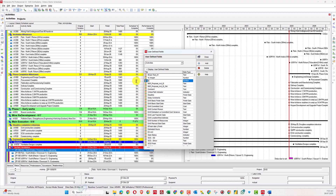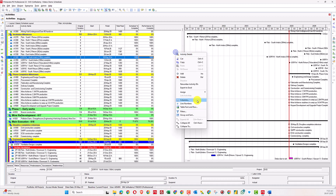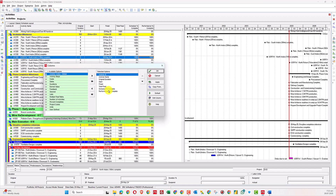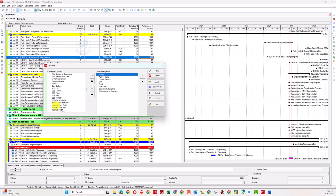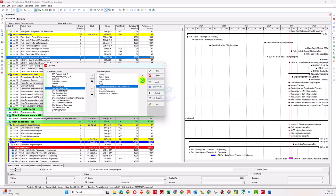I will create a number column and name it 'Difference in Schedule Percent Complete and Performance Percent Complete.' This is our new user-defined column. You can also add this column to your layout from the user-defined field section.